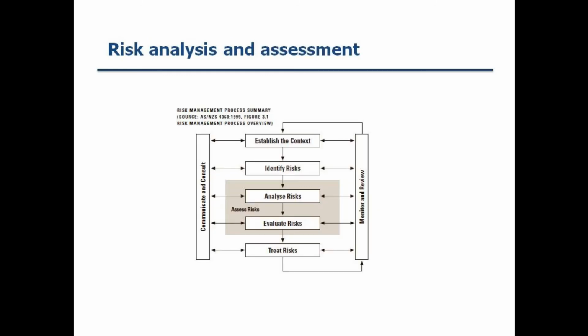So the analysis and assessment is an important step in determining, either objectively or subjectively, the chance of a high risk event occurring, and how it would impact on the successful completion of the project. The analysis and assessment, or otherwise we can call it the measurement, in respect to loss, damage, liability, is quite often made from historical claims or what other data we already have.